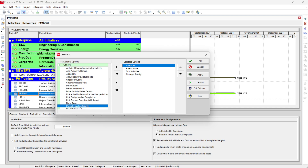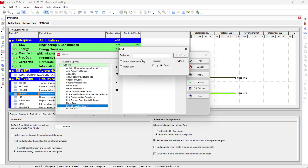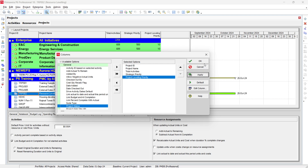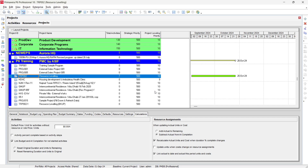If you have difficulty finding the field, click the down arrow, click Find, and type 'project leveling priority' — it will locate the field. Click Apply and the Project Leveling Priority column will appear. A smaller number means higher priority — for example, priority level 1 is highest and priority level 10 is lower priority.